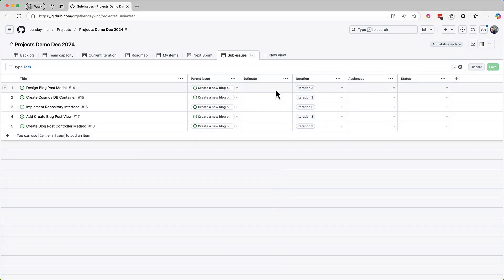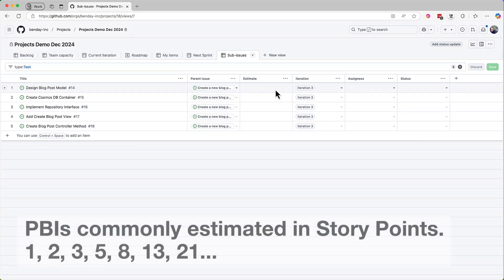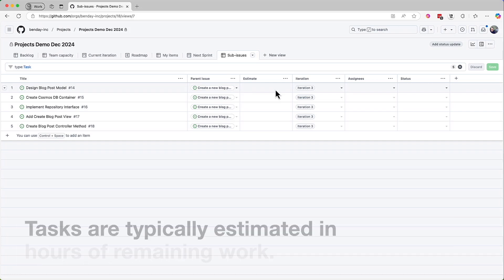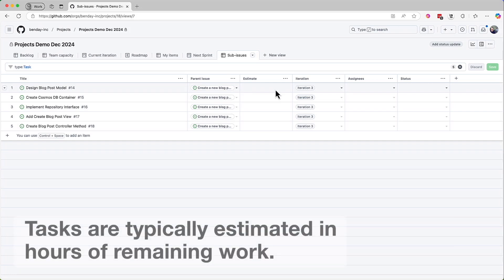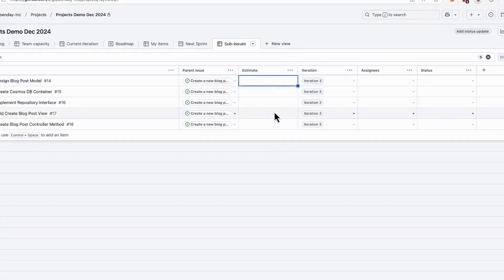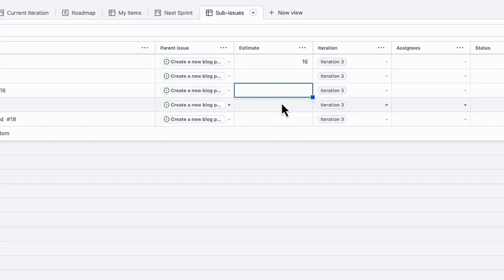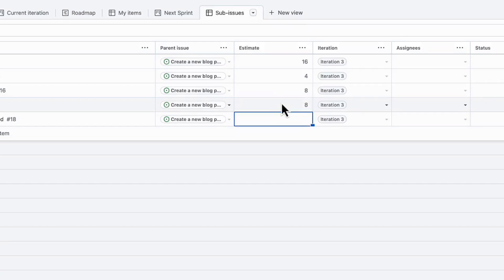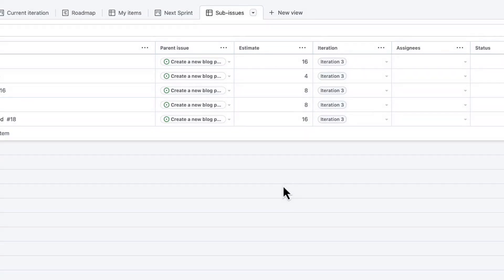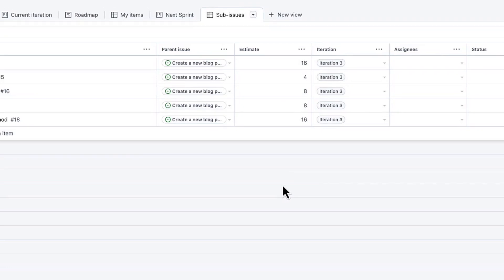The estimate values for PBIs or user stories or whatever you call the requirements, the estimate values are probably going to be story point values, and those values are probably going to be from the Fibonacci sequence. Tasks are usually estimated in hours, as in how many hours will it take to complete this task or how many hours are remaining. Let's assume that your team has discussed these hour estimates and has come up with a bunch of values. I'm going to just quickly plug them in here. Now all the tasks have estimates.